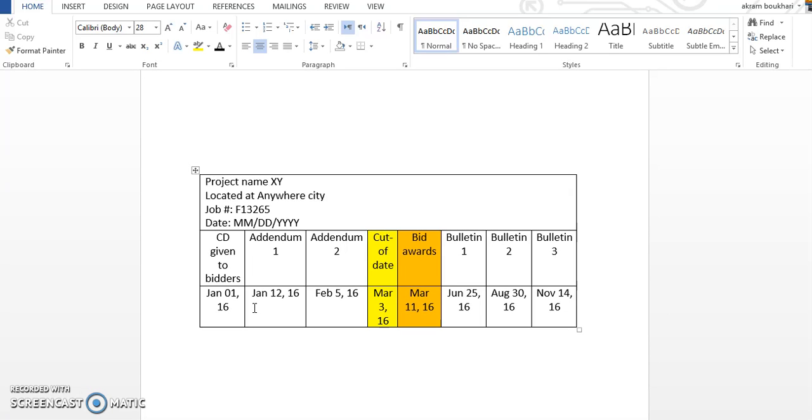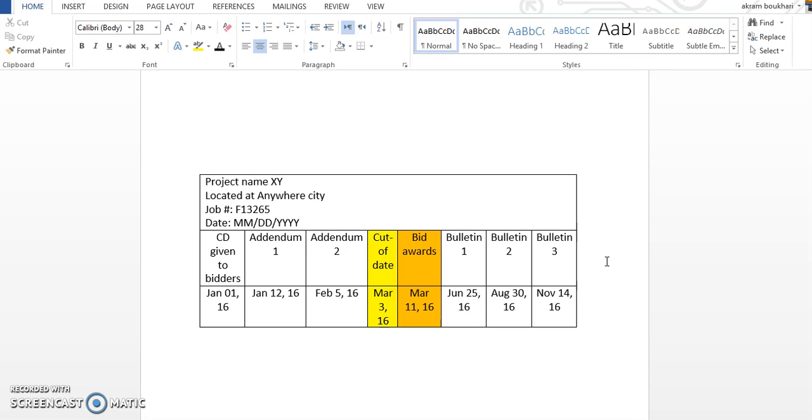So what is bulletin? Bulletin is changes also in either the specification or the drawing, but it is after the bid award, after signing the contract with the contractor and everything. So any changes we call it bulletin. It may be bulletin one, two, three, four, whatever. I've worked in a project where we had eight bulletins one time. In this bulletin, the contractor is liable for any cost impact or changes, and they qualify for change order, which we call variation order.